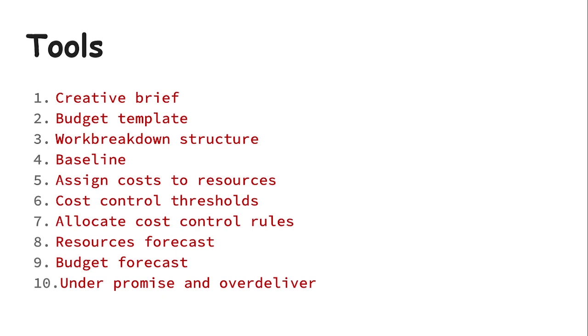Then four, have a baseline in place. This is an outline plan that covers essentials such as the initially budgeted revenue and estimated costs, and it lets you track your project progress and calculate its eventual value. Here you can establish guidelines to know how much you can spend on any given aspect of your project. As you hear the word baseline, you're gathering the initial information before you kickstart your project, how much you're actually going to spend on all the essentials.